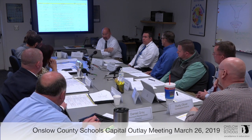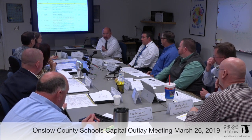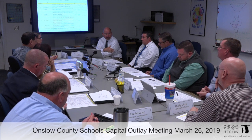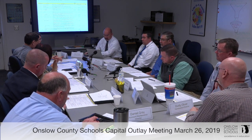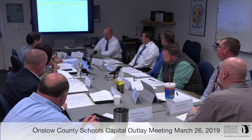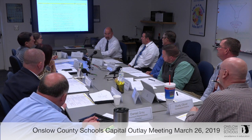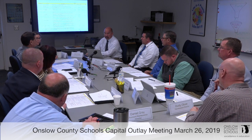So now, what I want to be careful about is, are we going to spend money for parking that's not going to be used in 2 years? Do you follow me? So the placement of this new school would impact enrollment for Heritage? It'll impact enrollment for Heritage, Richlands Elementary, and several schools in the area. Okay. And we'll do some load balancing at that point in time.